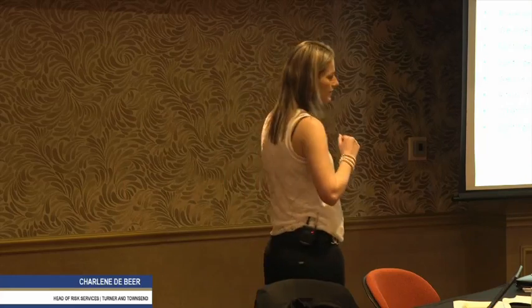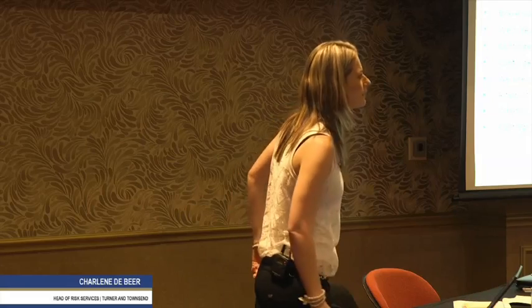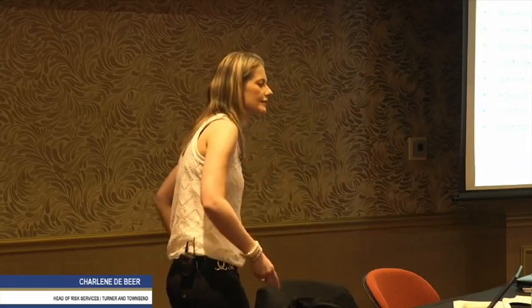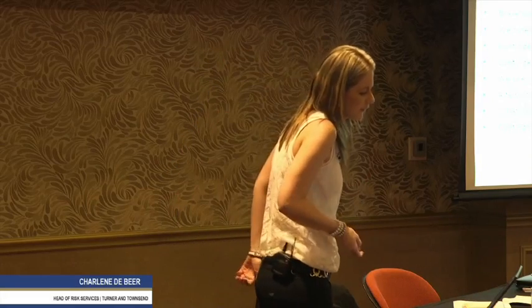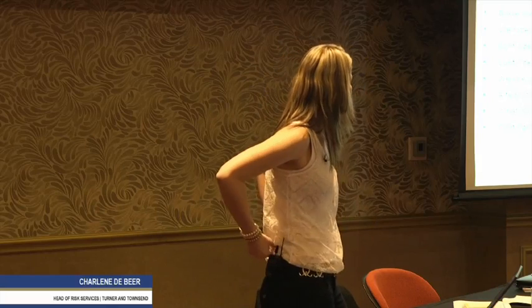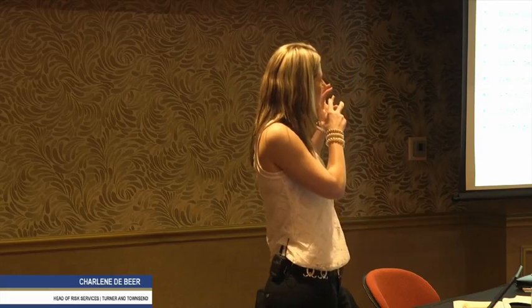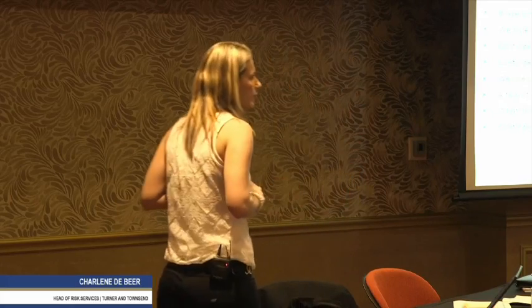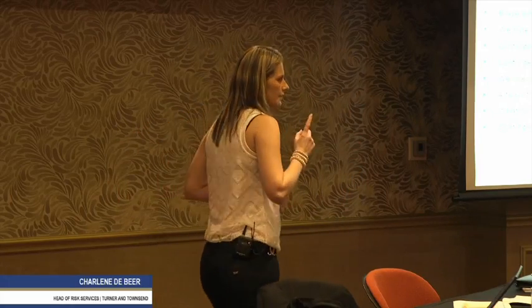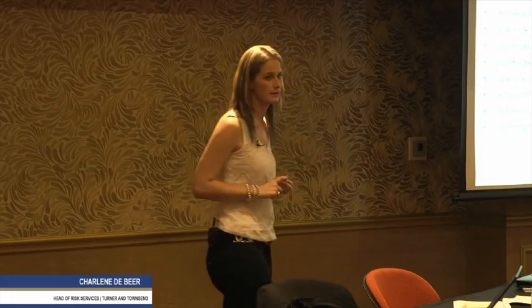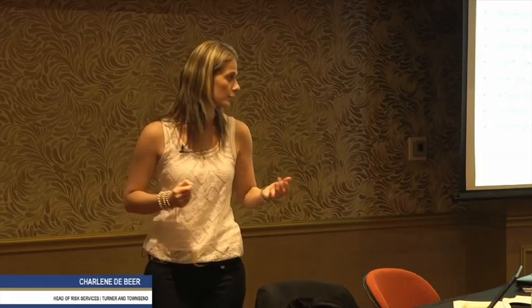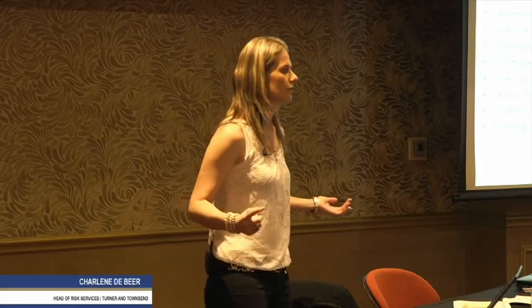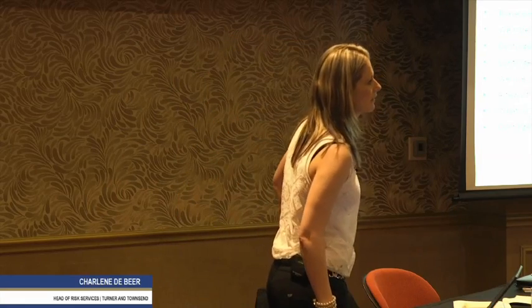So what these guys do at estimating phase, they say, no, we've allowed for contingency within the estimate, which we all know is standard practice, that's what they do. But because there's no logic behind it, no specific risk that they've actually costed and how they costed it, I've never heard that contingency in the estimate was enough to save a project, unless you guys maybe know of a project that was done, because it's possible. But I've never heard of a project that the estimating had enough fat in it to save the project, contingency-wise.